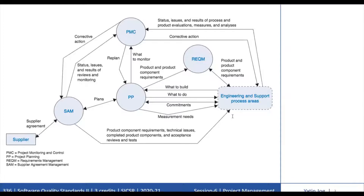The Requirements Management process area maintains requirements and describes activities for obtaining and controlling requirements or requirement changes, ensuring that other relevant plans and data are kept correct. It provides traceability of requirements from customer requirements to product requirements and up to component requirements. Requirements management ensures that changes to requirements are reflected in project plans, activities, and work products. The cycle of changes can affect the engineering process areas as well. Thus, requirements management is a dynamic and often recursive sequence of events.